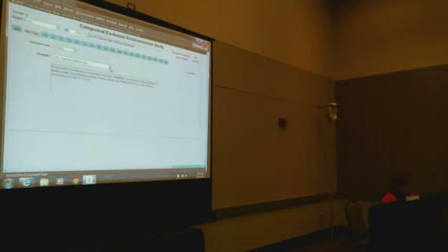One thing with classifying your project, we have a lot of projects that have a mix of things. So they might go in more than one category. Just use your best judgment. It's usually whatever is the biggest part of the project. So if it's highway modernization, but there's a lot of safety improvements, it might be kind of a toss-up as to which category it goes in. As long as you're close enough that it's an appropriate class of action, it's not necessarily wrong.